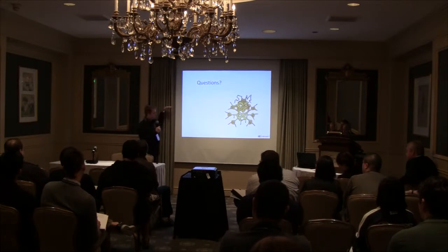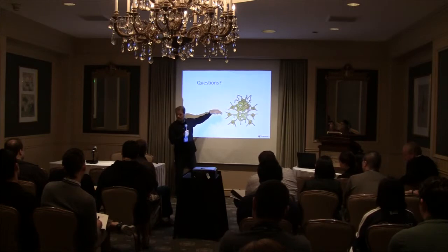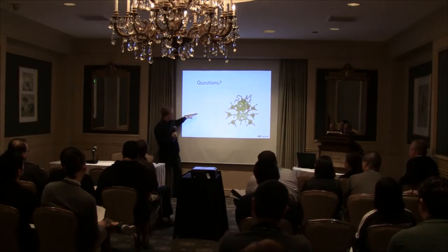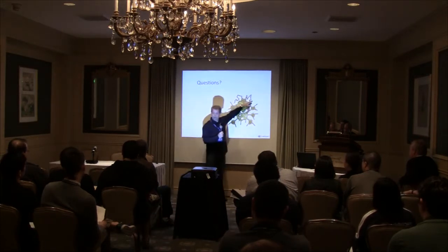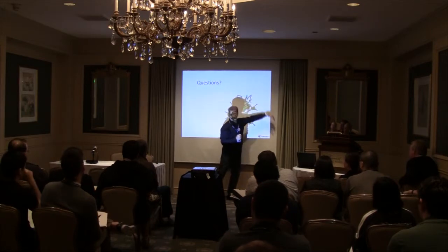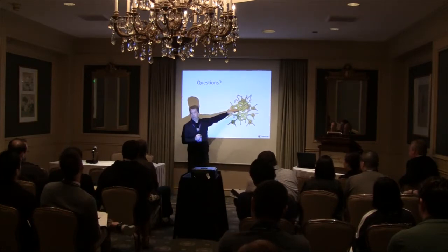If you can come up with this chart very quickly, one that shows that by the time we reach alpha our bug database is at a very manageable number, that's a very eye-opening piece of information. I will tell you most bug charts go up all the way toward alpha, and then at alpha it kicks up really high as we start testing, then it flattens out, and then it pans down. If we can show that bug chart going like this, so that we get toward alpha with a lower number of bugs,